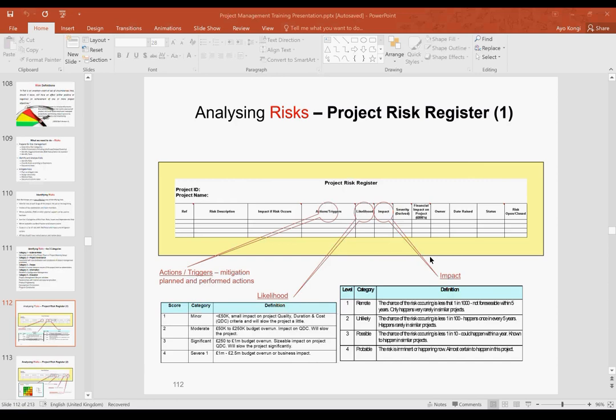Alright, so you have actions or triggers. Action is saying that, okay, what are the actions we need to take? The action we need to take is, if we can ask the mayor for a substitute laptop, you can get a substitute laptop for her to use, maybe our own personal laptop at home if she's got it, can you use it? Or we just schedule everything, we look at that, we say, okay, action is it possible we speak to our secretary to see if there is a space of 2 hours that she's not in a meeting, or she's in a meeting that she doesn't need a laptop? Then we can actually plan around our timing.